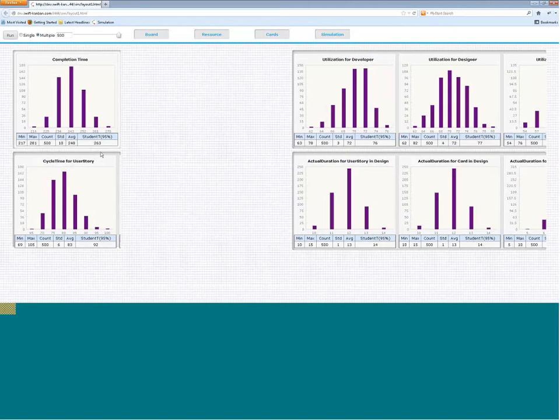So I'm able to go back to my customer or end user with a much greater level of confidence to say, if I commit to 263 time units, 95% of the variations that would happen in my execution, based on my actual project flow of the past data, are covered.